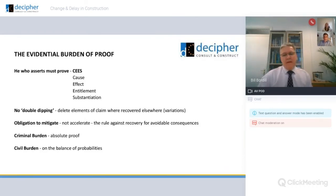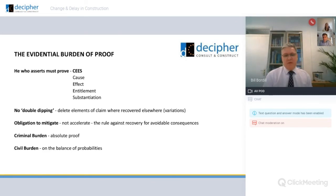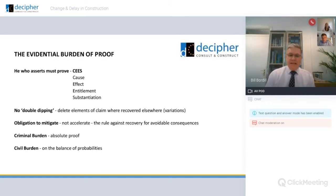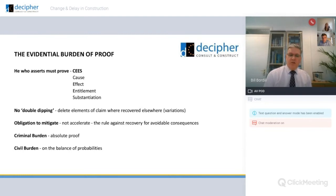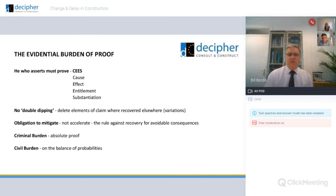On the burden of proof: when you put a claim together, remind yourself of the four C's — cause, effect, entitlement and substantiation. You need a causal event, you need to link that event to an effect, you need to establish entitlement by getting your notices in on time and complying with contractual requirements. Once those boxes are ticked, you need to evidence your claim — substantiate what you're claiming for. For that you need contemporaneous records to back up what you're contending was the impact of the breach.